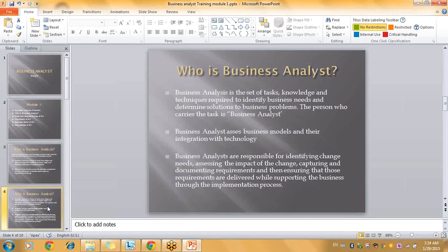If they say no, there is only an impact, it is only a simple format change, we can do it easily. You are okay to go ahead with the change. If they say no, if I'm changing it here, that will be impacting the other components of our solution. Here also we have to change in order to have this change.